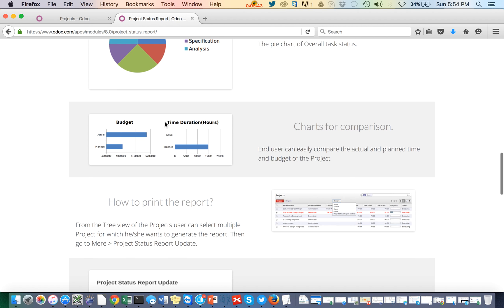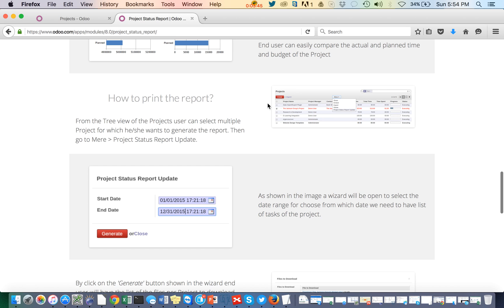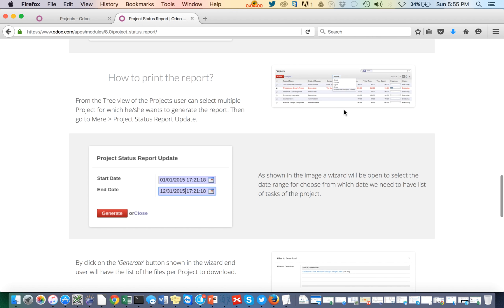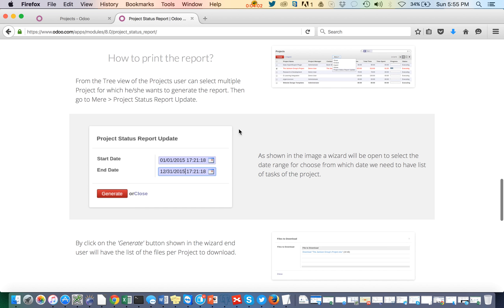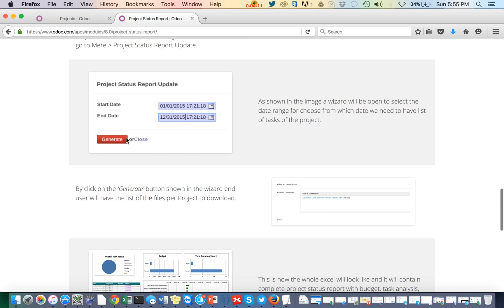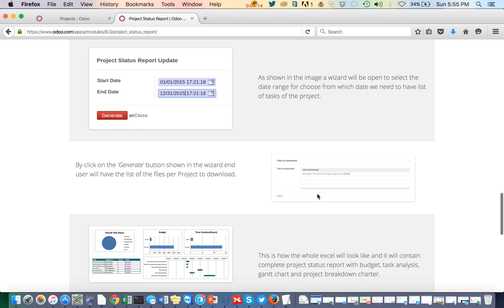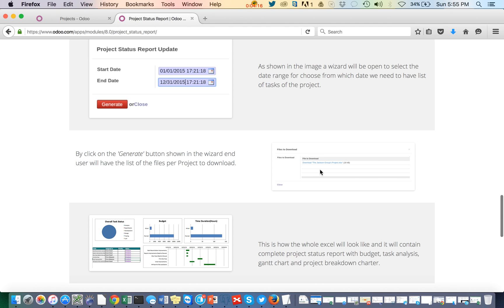Now, how can we generate these reports? In the project list or form view, you can select one or more projects, then from the action menu select 'Project Status Report'. A wizard will pop up asking for a start and end date. Select the dates, click generate, and the system will give you a link to download the report in Excel.